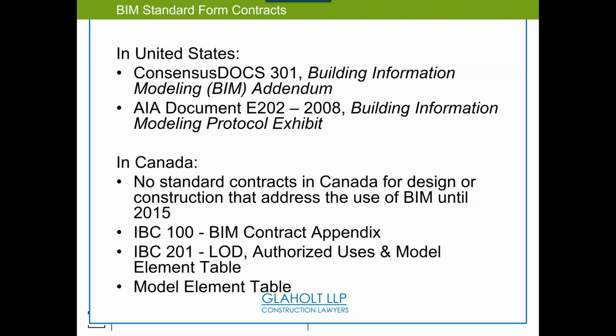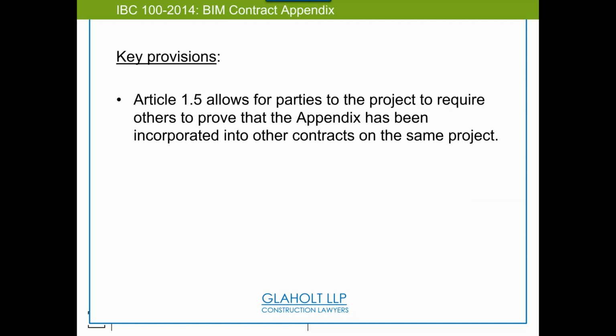Concrete was. At CH2M Hill for years, I was working on the water and wastewater treatment plants. The most important were the pipes and the concrete, the two most expensive items. Then slowly, when they got confidence in the model, they started to take note of the steel when there were superstructures made of steel. But the amount of concrete put in those pipe galleries, filters, and a whole host of chemical storage, blah, blah, blah, it was incredible. Concrete and pipes. And on a design build project for that firm, if I could have quantities nailed down for those two elements, that was the most important thing.